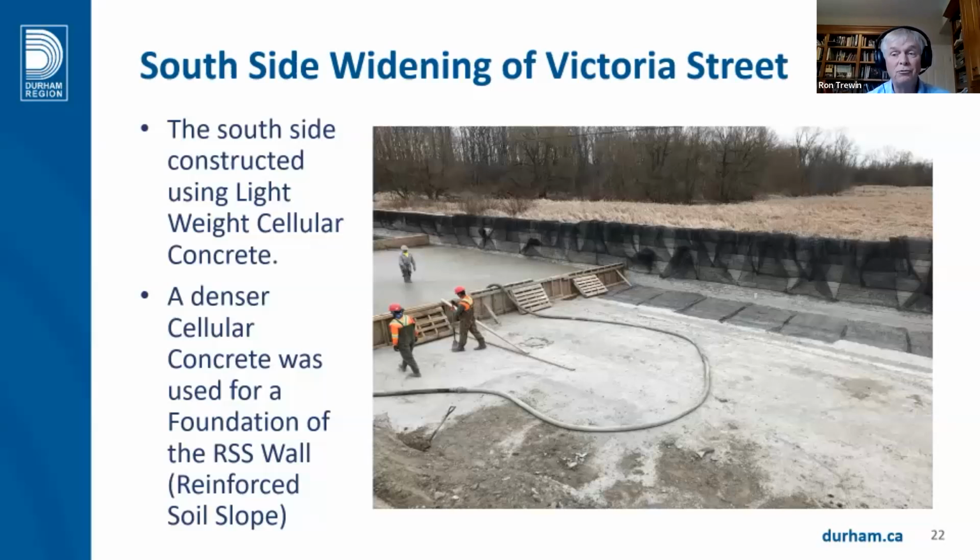One of our challenges during the design of our construction project was the disappearance of our soils consultant over one weekend with no proper handover, no follow-up or anything. This was before our final reports were signed and before we had an acceptable solution for widening the south side.